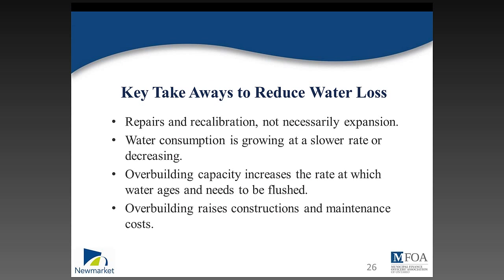So this is a concluding slide of the first part of the webinar, and I want to bring us back to the thesis: repairs and recalibration, not necessarily expansion. Water consumption is decreasing, and overbuilding causes excess water to be flushed. Because water consumption isn't increasing as quickly as people originally thought, maybe hold off on expanding a pipe, building a new reservoir, pumping station, or treatment plant. Each local utility may have its own solution to solving this emerging problem. Just don't go with the flow.